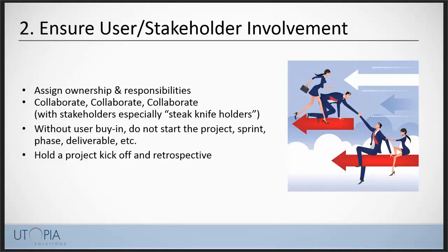One way to really get to that: I would not even start an Agile framework development project without first holding a kickoff meeting. And that kickoff meeting should include all your stakeholders. It should have all your QA team members, project managers, fly them in from Timbuktu. And if they happen to live in Portland, fly them in from Portland too. Bring your list of deliverables to the meeting with approximate effort levels. And if you don't have those effort levels, use that meeting to hammer out those effort levels.